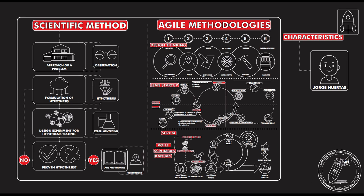All of these methodologies share the same principles, but the focus is different. Scrum and Scrumban are specific for IT and the software world. Kanban is specifically made for industrial production. Lean Startup is focused on new enterprises. Design Thinking is focused on developing products and services based on real needs. So even though they share some similarities, they are very different.